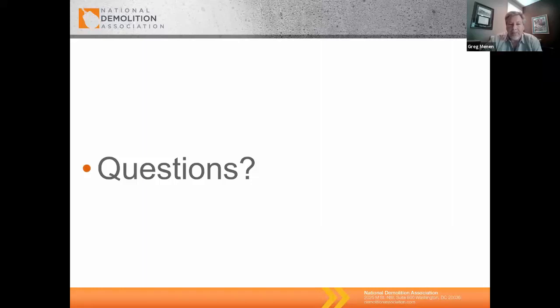I can also tell you that public information is available for notifications to the AQMD. Before you start any demolition project, as you know, we have to put in notifications to the Air Quality Management District, which requires 10 working days. It's not 14 days, it's not 2 weeks, it's 10 working days. So everybody needs to keep in mind that if they have a holiday, you have to account for that. And you can access and obtain that information. The only thing it doesn't tell you is about interior jobs or projects that don't require a notification.